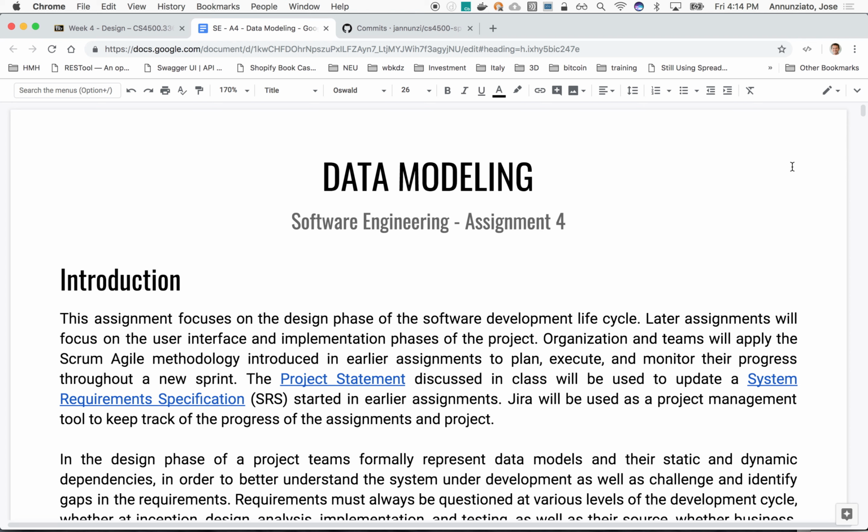In this particular sprint, I believe most students only have the SD1, SD2, SD3 boards, which is the organization board. It's only one board, and you see everybody's items or issues in one single board. That's fine for this sprint. So what we're trying to do is to create 3 additional boards. And for those boards, we'll update the filters so that the board for Team 1 will only show the issues that are assigned to folks that are in Team 1.